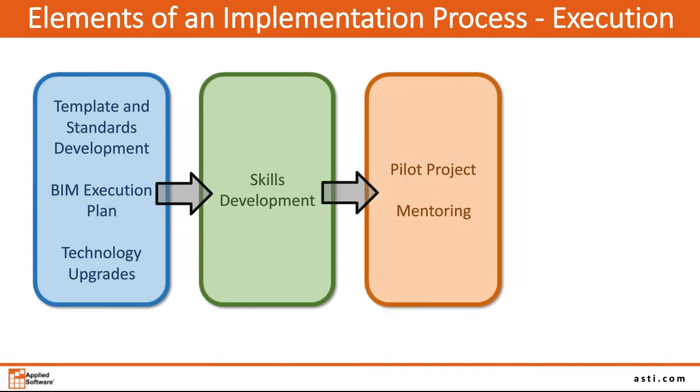And then very important is to follow up as soon as possible with a pilot project. Identify a pilot project and get started on it as soon as possible after the initial training, and allow for mentoring. And again, this is where that third party, that trusted resource can come into play, where they've been there, done it, seen it. They can help you with the mentoring and get you through those rough spots on that pilot project. Hey, I don't remember how to do a hybrid detail in Revit. I've got these AutoCAD standard details that I want to convert to Revit. How do I do that? Well, a 1 to 2 hour mentoring session can get you through that hump.